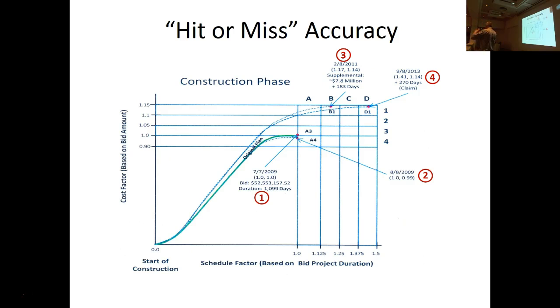So we came up with two approaches there. One we call more of a macro approach, looking at past data, the S curves for past projects. The other approach is a bottoms-up approach, trying to build up the cash flows on an activity by activity basis. Knowing the kind of project we're going to build 4 years from now, we know what kind of activities are going to be in the project. Using parametric cost estimates, we can figure out the amount of money we're going to spend for each of the activities, and then figure out the timing of the activities. I'll go into this in more detail. I'm just giving you the overview. But let me start with the first one.